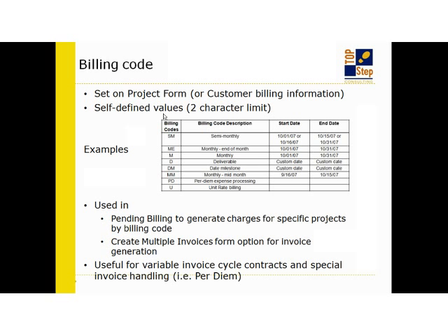And what this customer did was they set up billing codes to help them tag projects to see how frequent the invoicing should be. Okay, so customers that needed to get an invoice semi-monthly, whenever they ran billing, this Friday is the semi-monthly and monthly invoices, I would run billing codes SM and M, and only projects that have those billing codes on it would show up in my billing report, and therefore I could generate those invoices without any headaches.